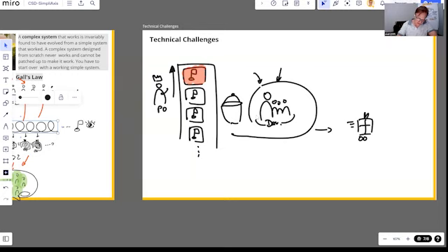So they discuss, and then they select items, right? It could be a couple of these, right? They select items into that very small bucket. And then after they commit on these items, they say, okay, we're going to deliver these two. And then they create a plan. They create a small, very detailed and focused plan to deliver that in these 2 weeks.